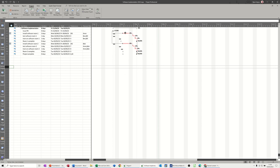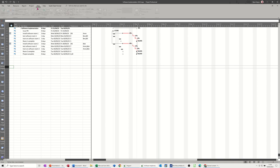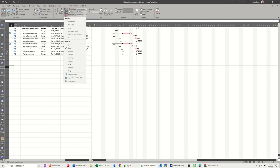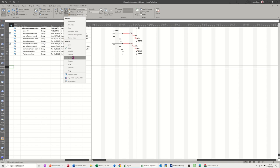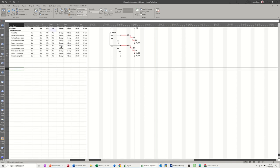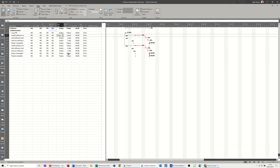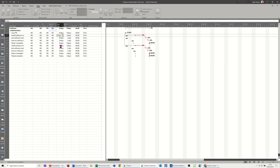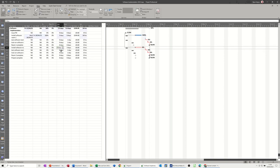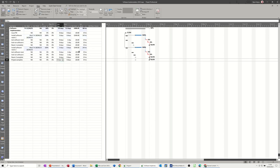Now, none of the tasks have been actually updated as complete. The start date's moved. But I'm just going to update some of these and put the tracking table on so you can see how that would impact the traffic lights that I'm going to put on. So if I go into the tracking table and just update some of these actual duration times, say three days and three days on that one. So that should have cost me some extra money. The actual cost is $240. It was just a one-day task initially.